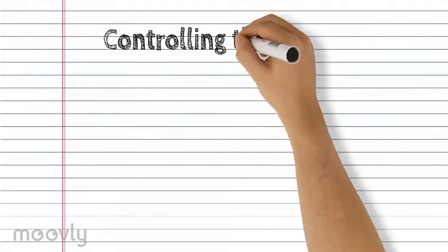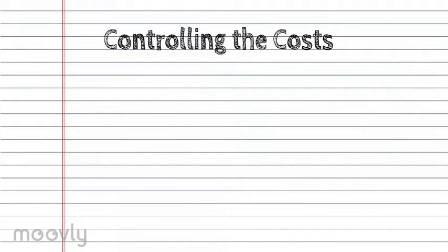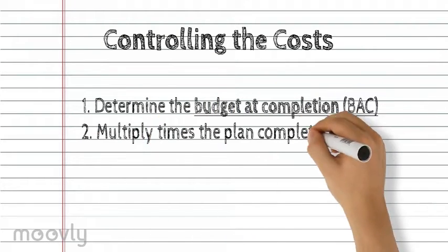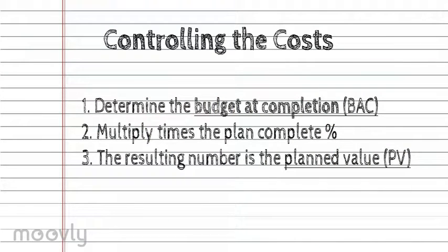There are many tools for estimating, but what we used was the 3-point estimating, or the PERT estimating system, which is the worst case, most likely case, and best case scenario, and we ended up going with the most likely case scenario.